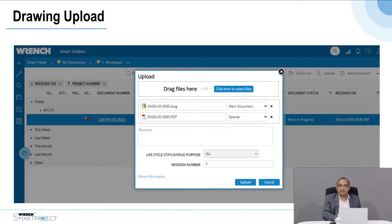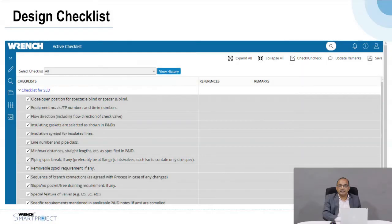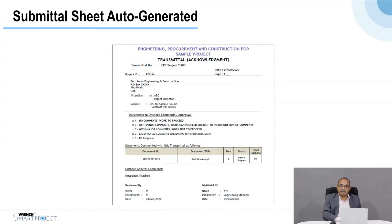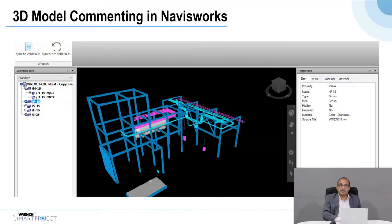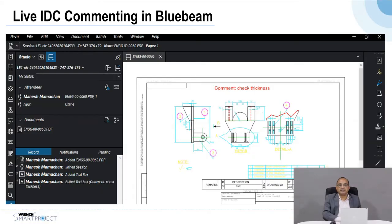Once the drawing is ready and uploaded, the system can pop up a checklist prompting the contractor or consultant to verify certain parameters before the drawing is submitted, ensuring minimum mistakes. Once the checklist is done, they can submit the drawing through a submittal which is automatically generated with a unique reference number. These drawings go to the owner as 3D models or 2D drawings. If it's a 3D model, it can be accessed in Navisworks or as a Revit model; if it's a BIM model, it can be accessed through Forge within the Wrench environment. 2D drawings are maintained as PDF and CAD files.